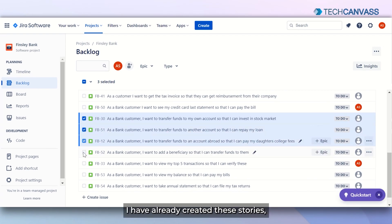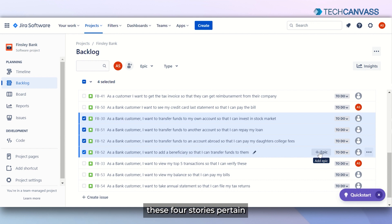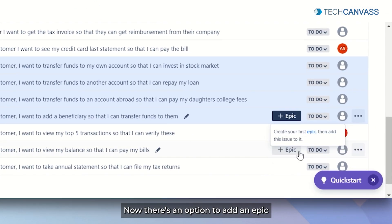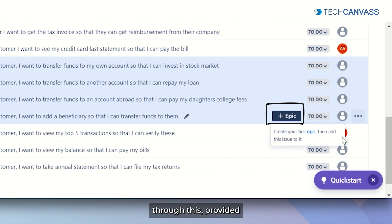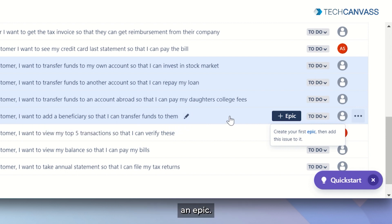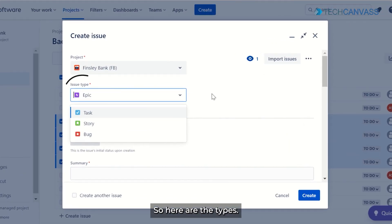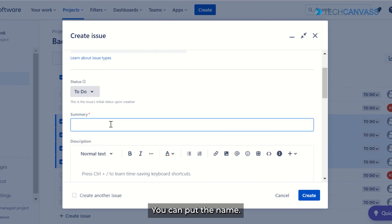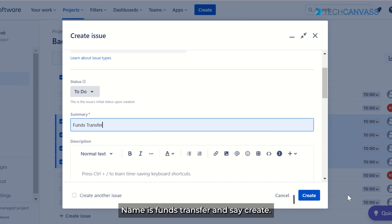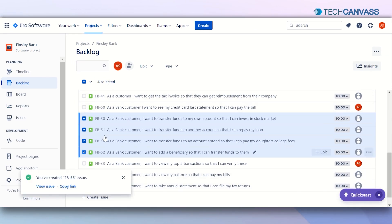You can see that I have already created these stories as shown earlier. These four stories pertain to funds transfer. There is an option to add an epic, provided that epic is available. There are two ways to create an epic — you can click here to create your epic, or you can click on Create. Here the type epic is selected; you can put the name. I will name it 'Funds Transfer' and click Create. So now the Funds Transfer epic has been created.